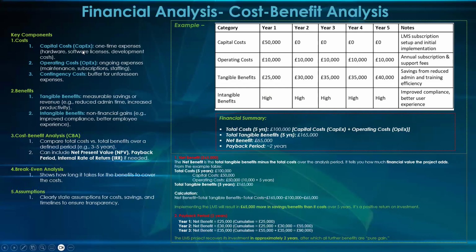The capital expense. That's the CapEx. Is that one-time payment, one-time cost? For example, this project, they say it's going to cost, say, 80,000 pounds, for instance. Or say 50,000 pounds. That's the cost that you use for the implementation of the project, where you pay your developers, your QA, your Scrum Masters, and buy all the licenses that you need. One-off cost.